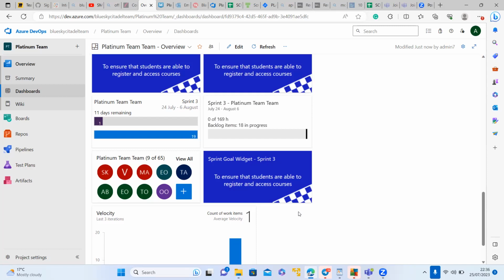So with that, you know that you are the evangelist for the process. You want to negotiate that with the PO. You might end up taking in half of what you have already in the sprint now. One of your negotiations would be to tell the PO that if we can reduce it to 6, work on 6, and if we finish it before the end of sprint, we're able to take in more. So you're not moving everything back to the backlog.